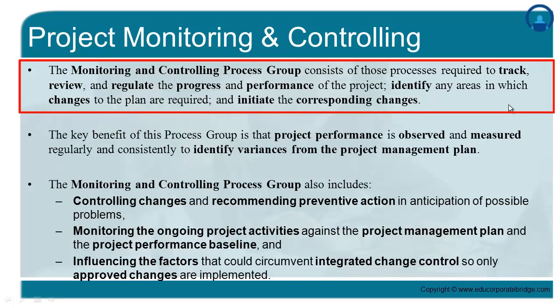Accordingly, when a change request is raised, it will go through the integrated change control process, which is again part of project monitoring and controlling. That change request will be evaluated, analyzed, and assessed, and its probable impact on the different aspects of project management and execution will be identified. Accordingly, those changes will be applied in the respective project management plans and then taken up for execution.